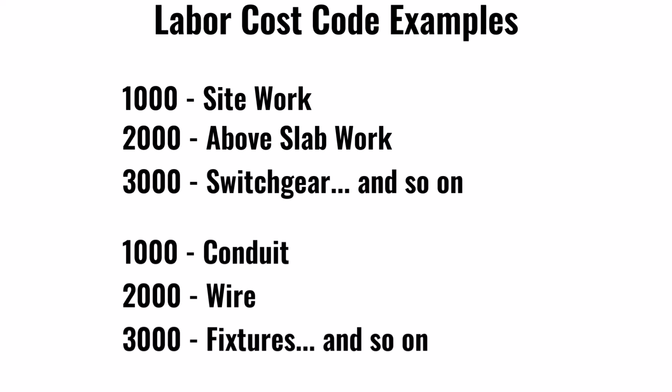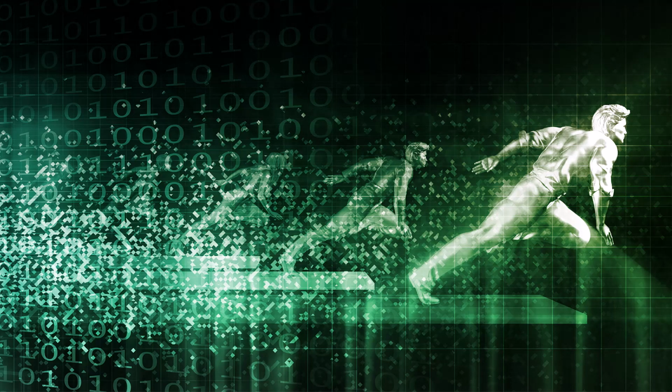We will touch on this in more detail in the future, but you need to understand that if you're going to make labor installation predictions in the creation of an estimate, you should track actual progress to ensure that you're meeting those installation goals. These cost codes can be adjusted and as detailed as the company might prefer in order to build accuracy. The data from tracking in this manner can help fine-tune competitive edge and help identify problem areas that need attention in order to compete in the marketplace.